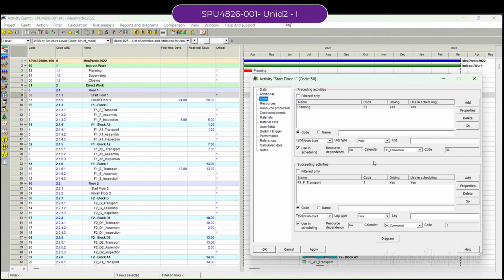Because if you say that after painting the next activity must wait 2 days, not 2 business days, just 2 days in order for the ink or the wall to become dry. Okay, imagine if you finish your painting on Wednesday and you have to wait 2 days. Thursday and Friday. The next activity must start 48 hours after.